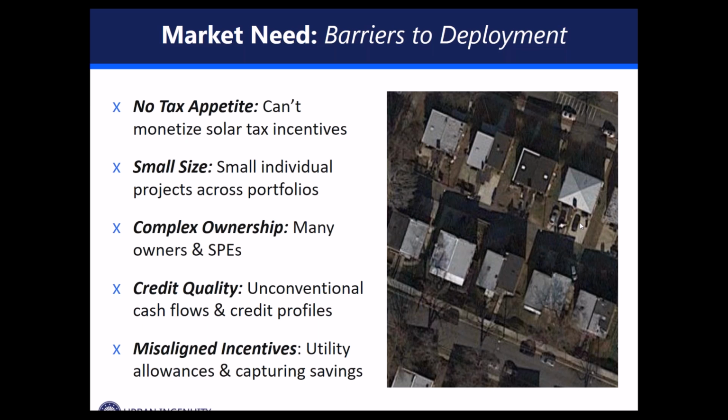So the aggregation can be challenging. And then, of course, in those ownership structures, it's often bankruptcy remote entities. You may have low-income housing tax credit investors, other third parties. You may have a housing authority with a land lease. There's a lot of people with claims to the property. So the ownership structure can be an inhibitor. And frankly, anything that creates risk is going to discourage moving forward with the project. And even the perception that things are slow can discourage either the property owner or the investors from advancing these projects.